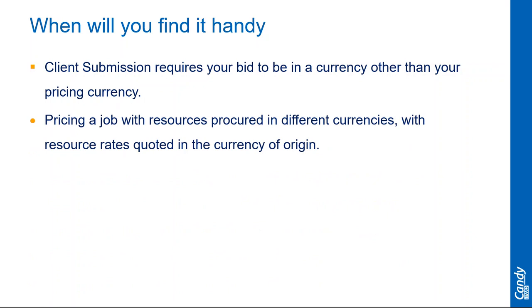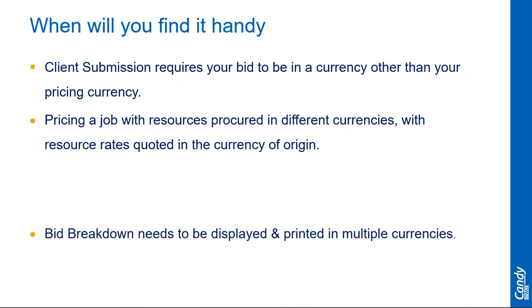When you're pricing a job with resources procured in different currencies, meaning you're pricing a project in the UAE, but you're buying your diesel in Saudi riyals, or you're paying your equipment supplier in dollars, the Candy foreign currency pricing tools would be used then.